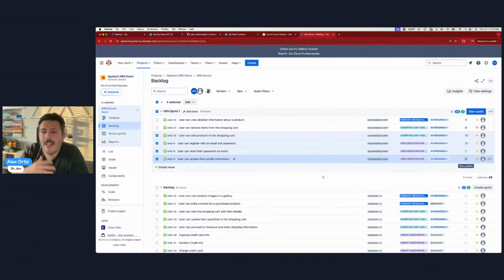From my experience, with the higher numbers, your developers are throwing you the biggest number they can give you so that they can basically figure it out over the sprint, right? And that's not a situation you want to put your developers in, because if they're figuring it out during the sprint, they're probably going to use that sprint as their discovery, and then it's going to roll to the next sprint where now they've made the discovery, they can fix it. And it's just not good, right?